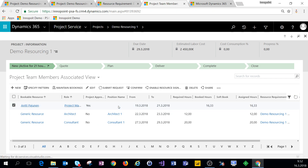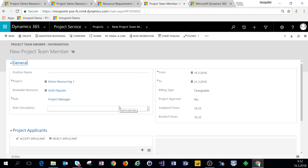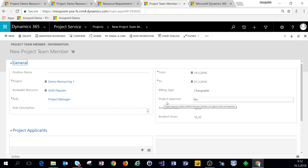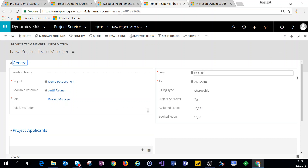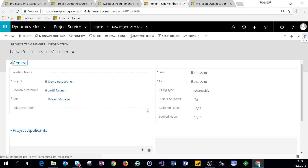If I double-click on this record I can see my billing type as well as whether I'm a project approver or not. A project approver is a person who approves all time and expense entries for this project, and you can have multiple project approvers if necessary. Make sure you have at least one project approver who can approve time and expense entries for your project.